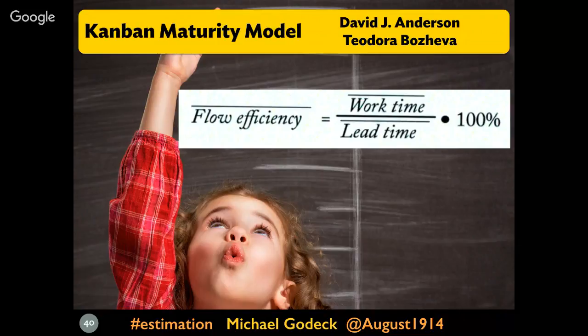Anytime you're using discrete value point estimates, you're bundling your assumptions in with the estimate. Those principles apply as much to project management as on any other level. The technique that we use for this is Monte Carlo simulations, right? Monte Carlo simulations are simply the way we do math with uncertain quantities. If you have a project, you identify the 3 major risks of that particular project, because the risk could be different for each one. You express your uncertainty in ranges instead of points, and you qualify that with probabilities.